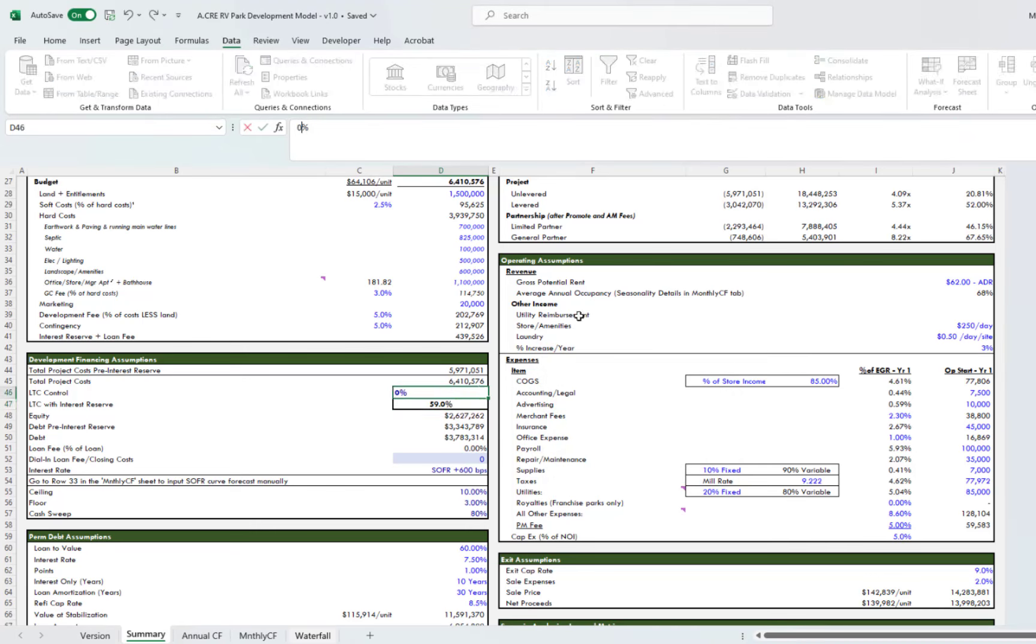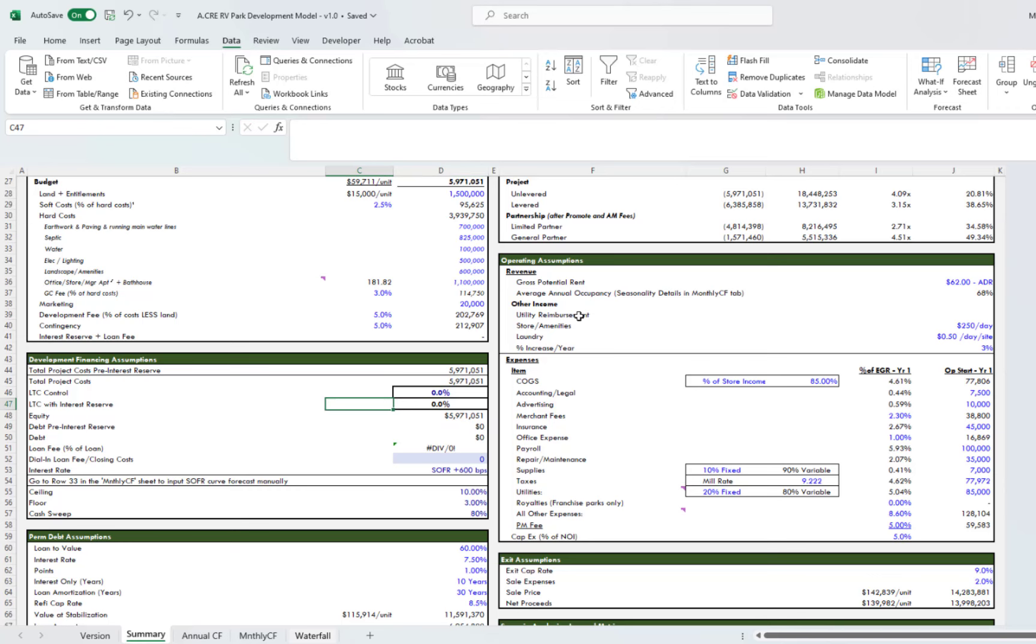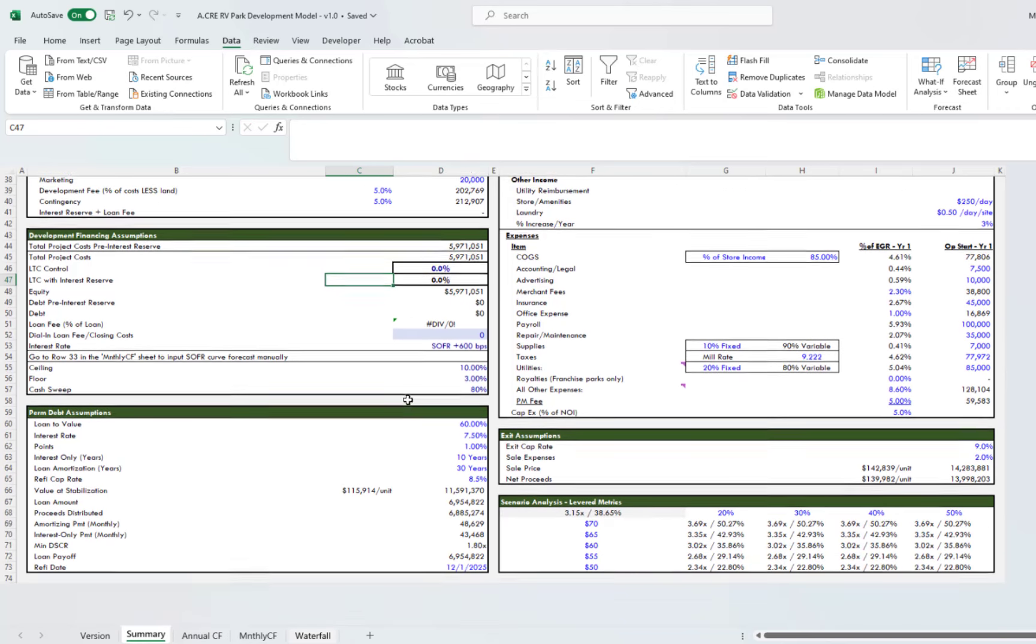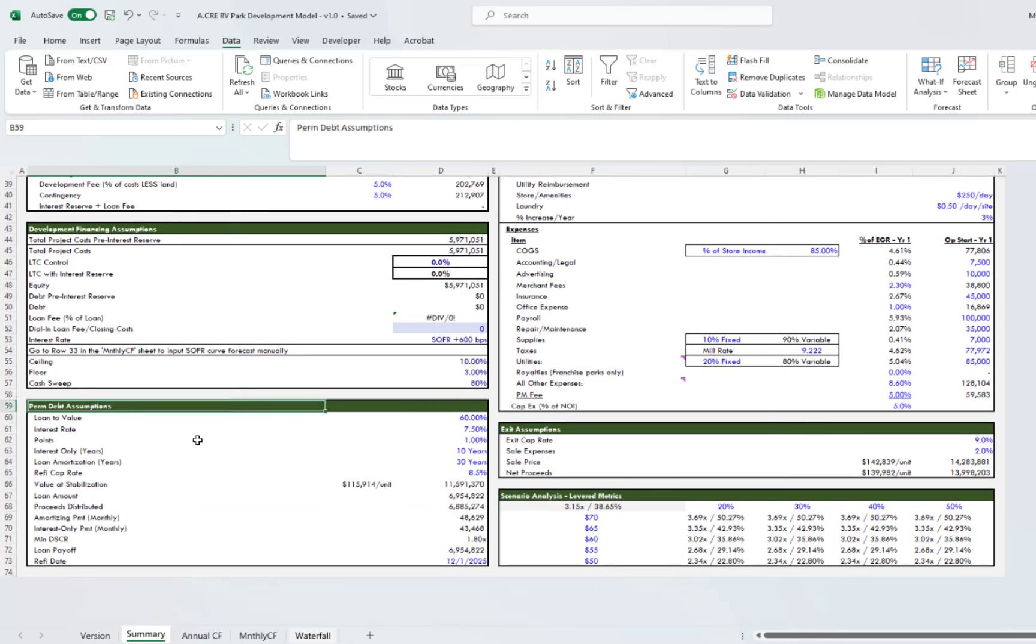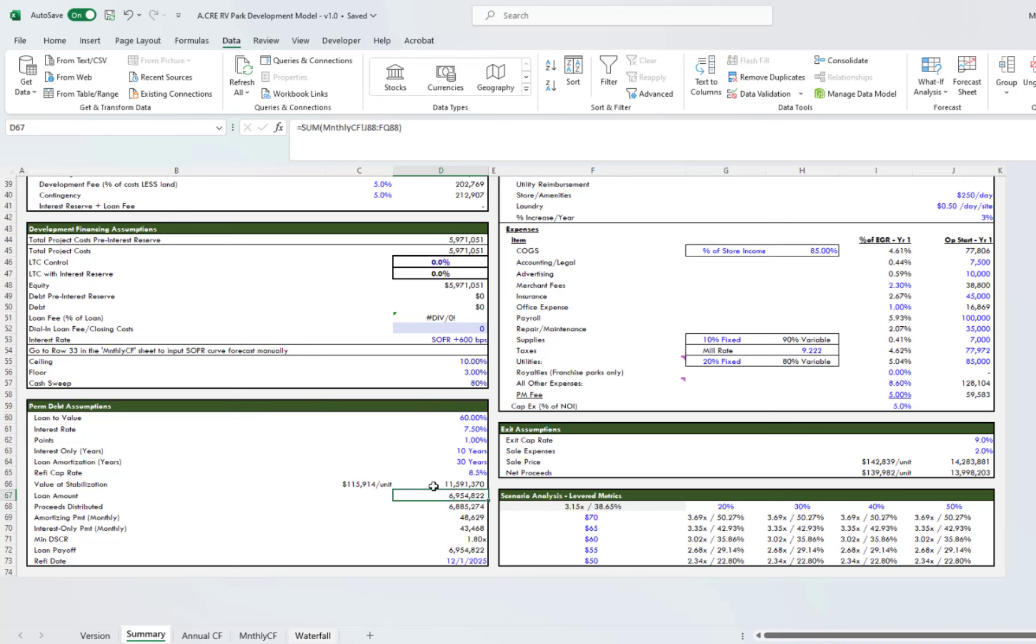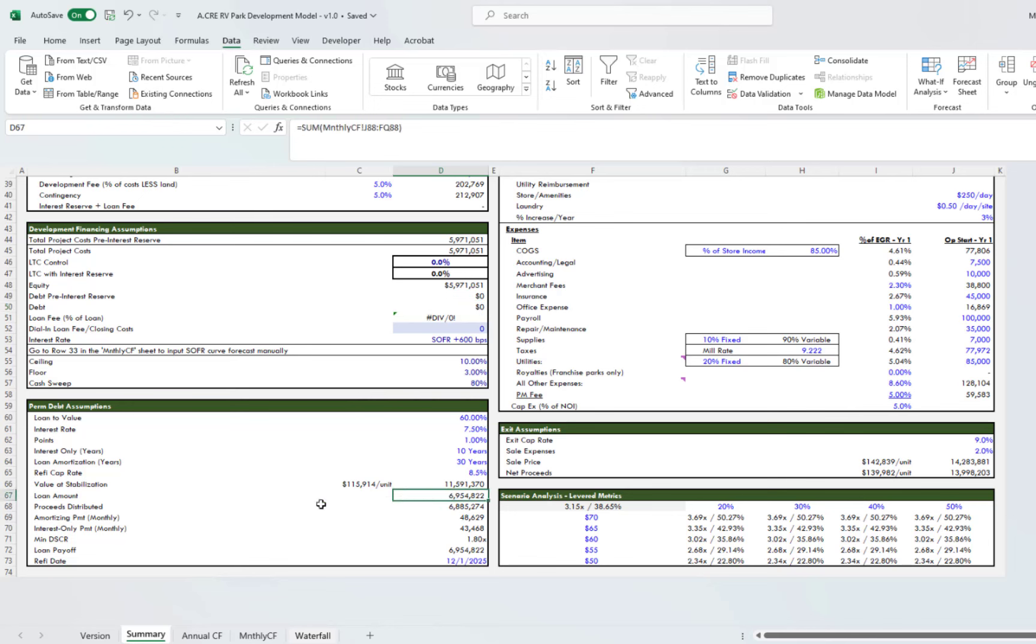Additionally, you'll dial in your loan fee down here, so you'll plug that in manually. That's your development financing assumptions. Below that you have your permanent debt assumptions here. One thing to be certain of when you do this—maybe I'll put in some conditional formatting—make sure that your loan amount that you get from your permanent financing is larger than the total debt amount. If you don't do that, you'll still have some construction financing remaining and you'll be paying interest on that all the way through the model. Make sure that when you're doing this, you check to make sure that your permanent loan amount is taking out your construction financing completely.